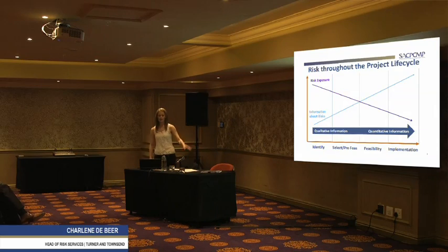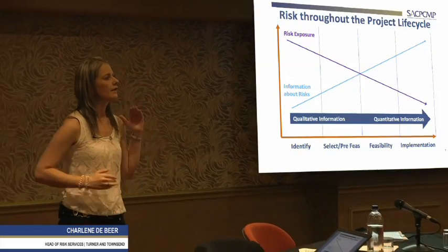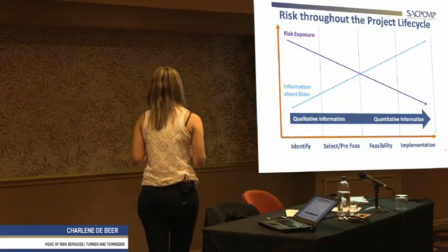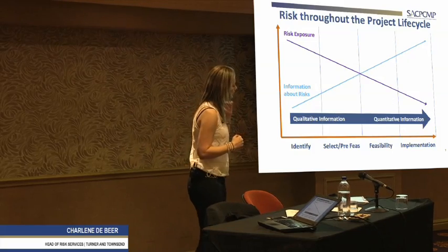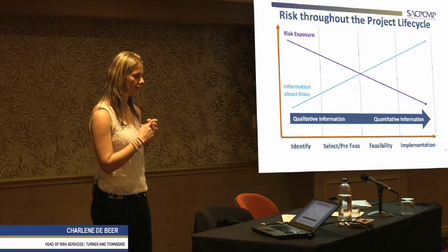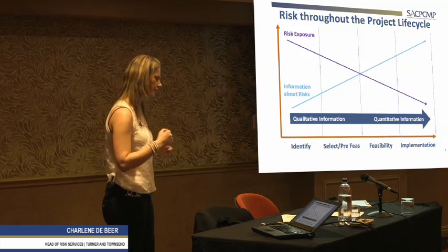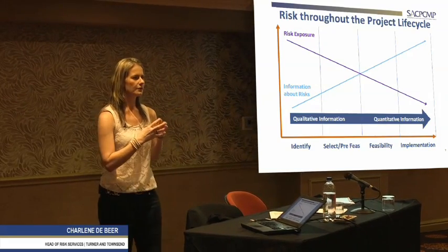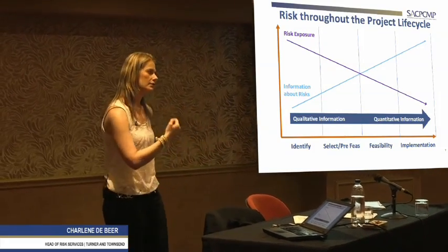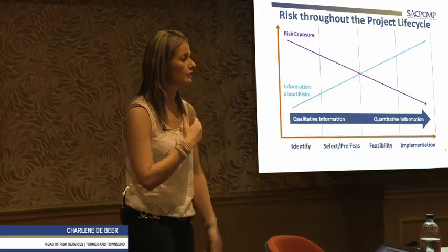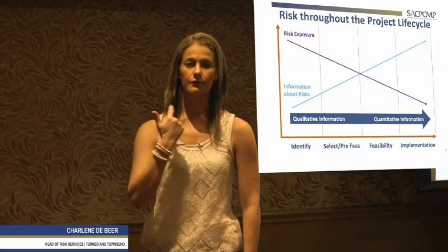Okay, so with little information, of course, your risk exposure is very high. The more information becomes available to our disposal, the less the risk would be, in the sense that it's not to say that the risk impact won't be major on your project. It's just saying that the more info we have, the better we get at being able to assess the risks, to cost them, and to put any treatment or mitigations in place to try and either prevent them or reduce the impact.